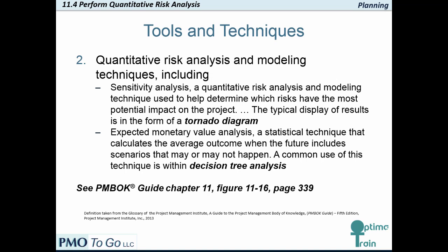If you have a new decision node, draw out lines representing each option that you could select. From the circles, draw lines representing possible outcomes with associated probabilities. Put a box on each line saying what it means. Keep on going until you have reached end of branch on all branches. Calculate the net value of each branch, which should point you to the best solution.